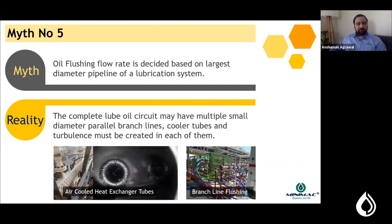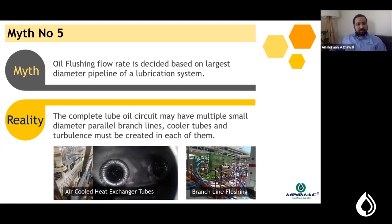Myth number five: oil flushing flow rates are decided based on the largest pipe diameter of the lubrication system. Lubrication systems are networks of pipelines — header lines, branch lines, and piping to various bearing points. It is important to find the turbulent flow rate requirement for each piping segment. Using the P&ID diagram, you calculate the maximum flow rate needed for turbulence in each loop, accumulate them, and determine the total oil flow rate required.